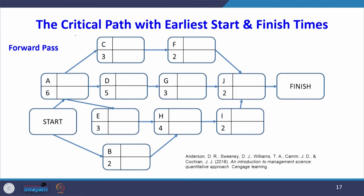Now we find earliest start and earliest finishing time using the forward pass method. We start from 0. Activity A gives 0 + 6 = 6. Then 6 + 3 = 9, 6 + 5 = 11, 6 + 3 = 9. For B: 0 + 2 = 2. Then 9 + 2 = 11, 11 + 3 = 14. For activity H, there are two ways to reach it — values 9 and 2 — so we take the largest: 9 + 4 = 13.